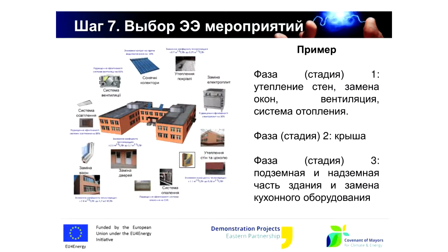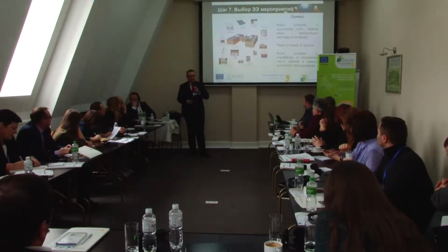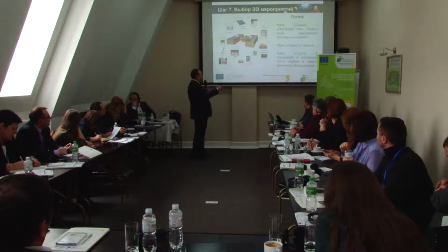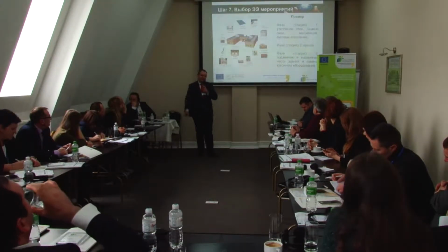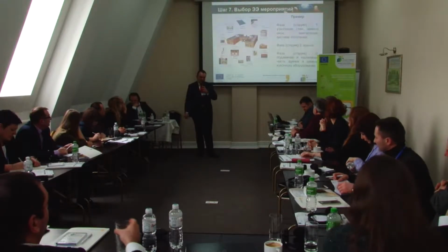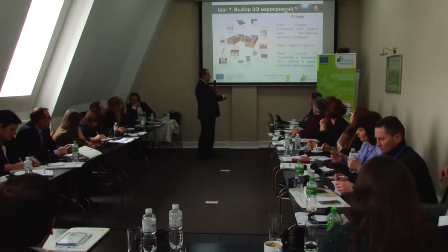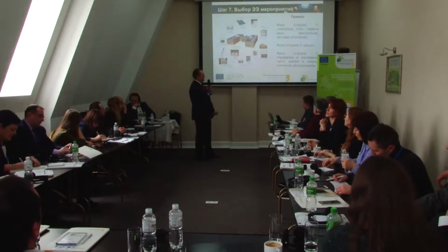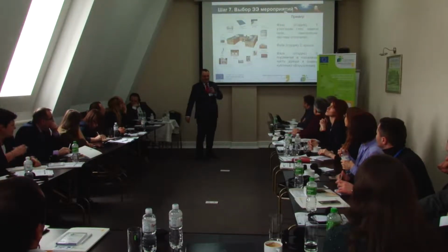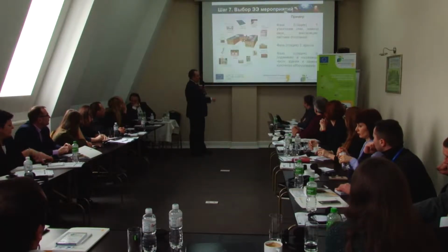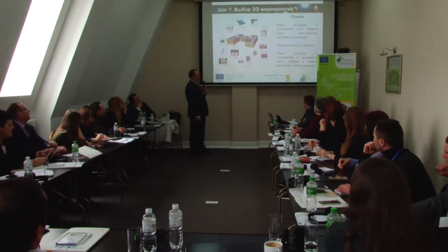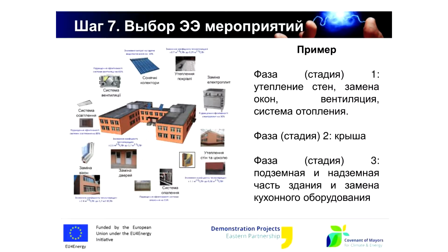Then we get to the stage of selecting specific measures or actions, and it can be that the measures selected at the stage of energy audit that met the budget have changed after the development of the design, and it means you have to select already a clear set of measures that are going to be implemented.